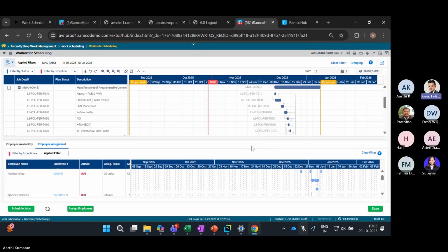You have to have manpower, right? Yeah. So as you see, the capacity of each of the personnel comes from the roster. So we understand what is the shift that they are available on, what is the exact duration of the time frame for which they're available, and that, taken from the roster plan, is projected here as well in conjunction with your job information.